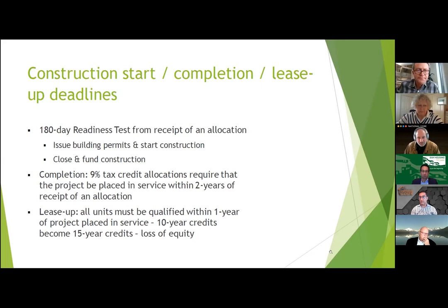In general, the drivers are critical because, obviously, you don't have that on the tax-exempt 4% side, but there's interest carry, there's interest lease-up carry. And the one thing to remember with these projects is that when we receive an allocation, and we've been applying to all these funding programs, these amounts are fixed. This is not like a market rate situation where, hey, the market is hot, rents went up, you can offset. We don't have any sources to offset. These are issued and allocated based on costs 2 to 3 years backwards.